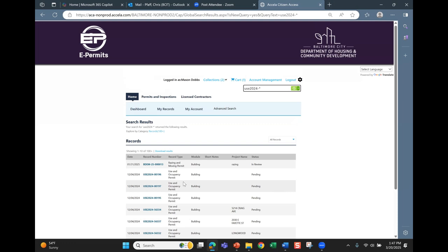Okay, and my second question is fire protection. Once I apply through you, everything gets sent to the fire marshal for review. They complete their review, and then they attach a letter with the payment information that I print and drop off at the fire department. I see that the fire marshal reviewed everything, but I don't see where the attachment for that letter is. Is there a place to look for it? Would it be in project docs or under e-permits?